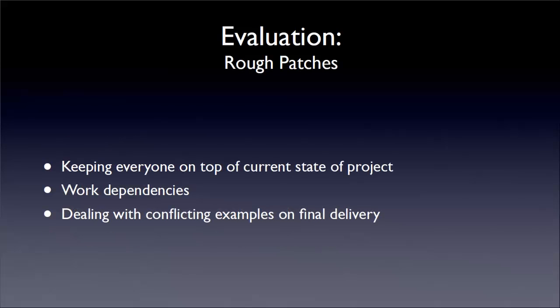As we were learning a lot of new information every week in classes, it was critical for our team members to keep up with the lecture notes, and there were a few times when members needed to be reminded gently. Another issue we ran into was assigning deliverables that relied on one another to separate members. This resulted in some members not being able to do their assigned task for that week until another member finished his or hers. Finally, due to the amount of examples posted on Moodle, it was unclear what was expected other than core diagrams. For example, the sample reports online had a lot more in-depth work than we were required to do.